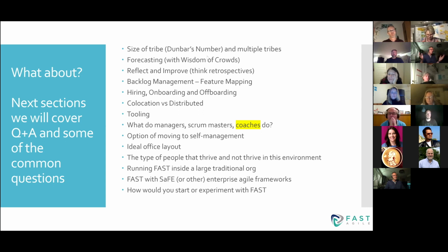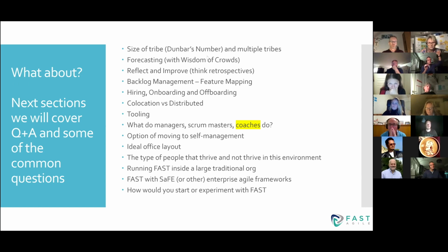And so when it goes multi-day, every day they clear out the marketplace and they repopulate it. What you repopulate that marketplace with may come from the bulletin board, or it may be new ideas that have happened. And that is very much in line with what happens with FAST. So the bulletin board is our backlog. And that's where we try and use story mapping. And we in fact refine that to something even more useful called feature mapping, but that's another topic in itself.